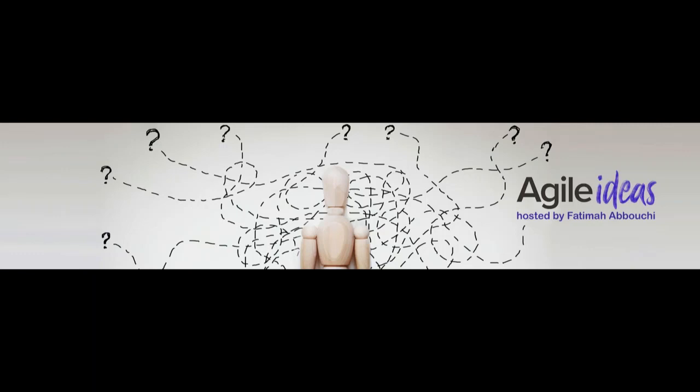And then what we did is we took that information and anonymously managed it, and then shared that information in a report, and also gave some recommended steps on how you can go forward to improve based on those lessons. And so that would be another way that you could go forward in tracking lessons and have those lessons outsourced. Therefore, you'll get probably some higher engagement and also some learnings from other industries, like the learnings that people are sharing when we have conversations with them about how things are running in their organization. So outsourcing is another option.